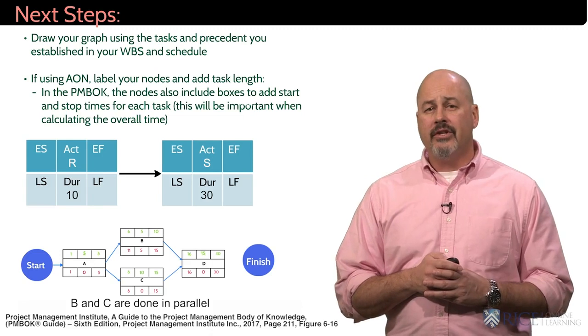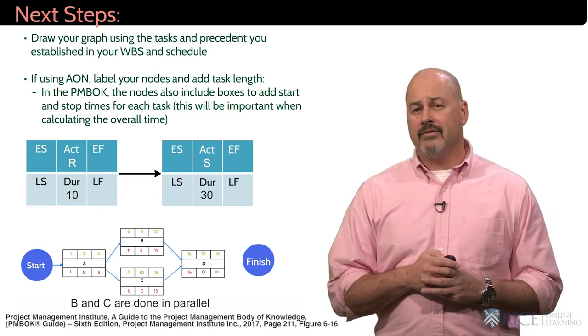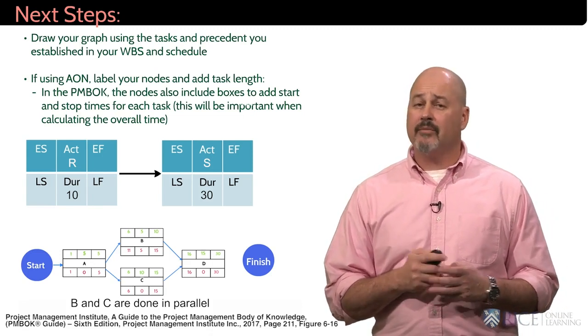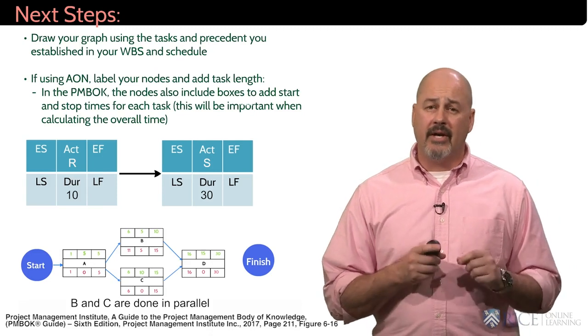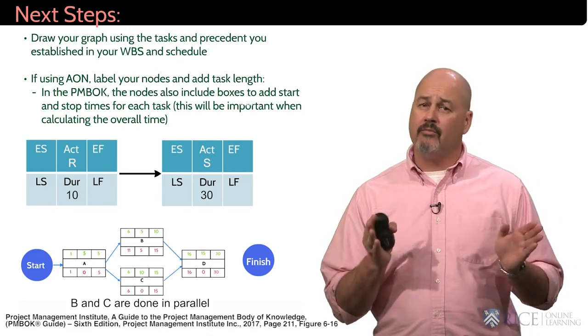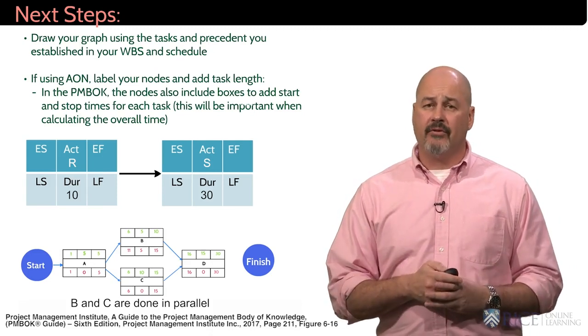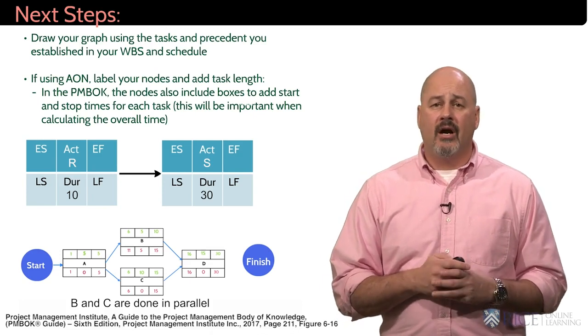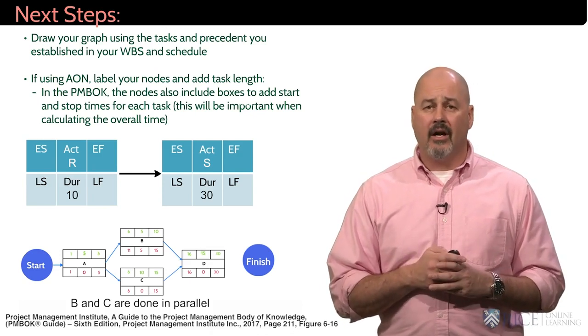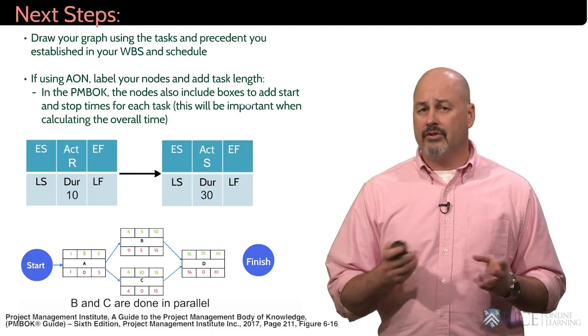Remember, you can use either letters or number combinations for tasks. For a larger project, it may be better to use a number combination like 1.1, 1.2, because you have more combinations available, but for this example we're going to use a very simple lettering nomenclature for simplicity.